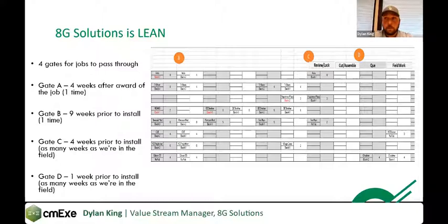He sits down with our shop manager, the project manager, our superintendent, our operations manager, and myself, and we go through the job. They lead it, it's their plan: how they're going to use their guys, what equipment they're going to need, and what we're going to do to efficiently do our work, right? And then also, that's when your fabrication packets are assembled and together.